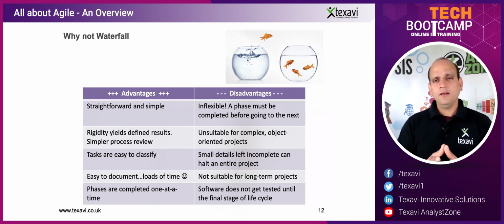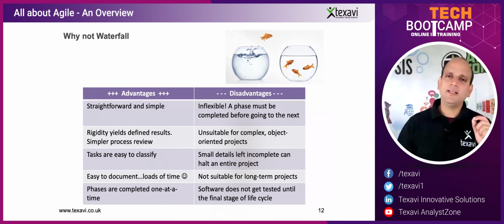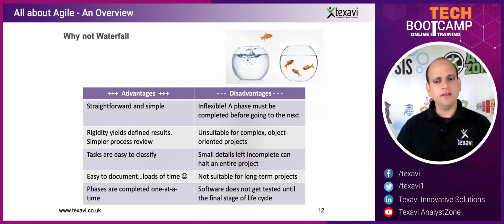End of the day, the moral of this particular exercise is that we totally ignored the non-functional requirement, capturing that specification initially and getting that from the client, and that was missed, and that project was a total flop, total mess. And the reason for that was that simple thing, and that really derailed the whole project.